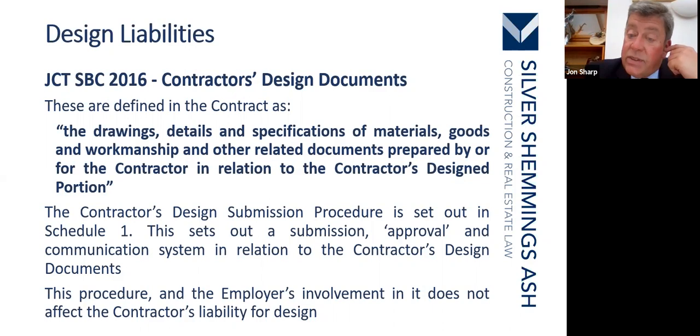It sets out a submission, approval and communication system in relation to the contractor's design documents. This procedure and the employer's involvement in it does not affect the contractor's liability for design. Again, seems rather unfair, but that's what the documentation and the contract says.